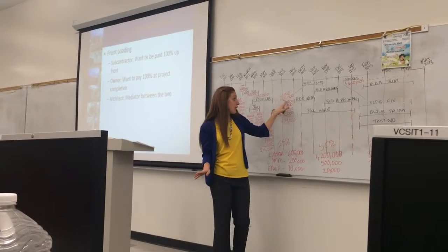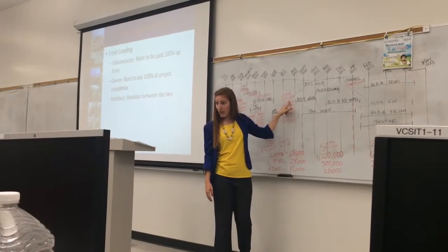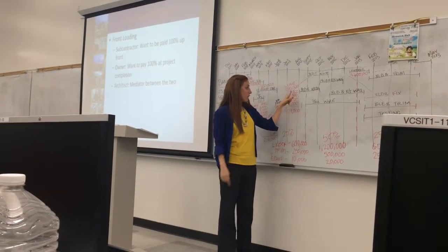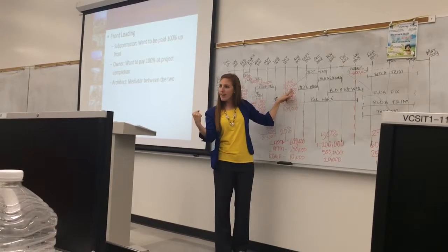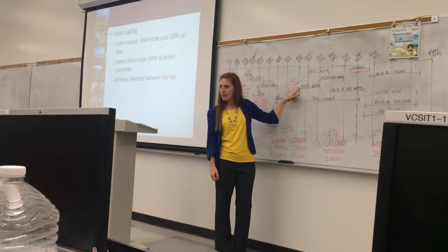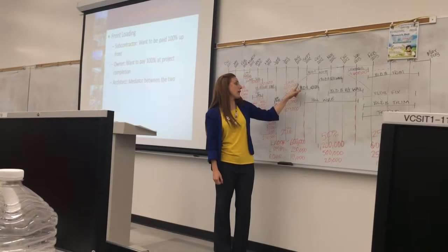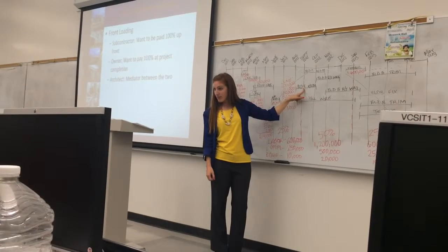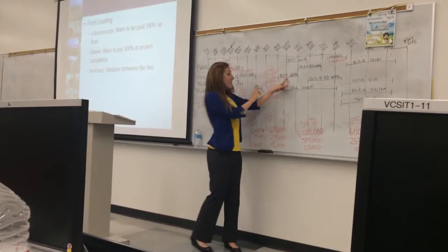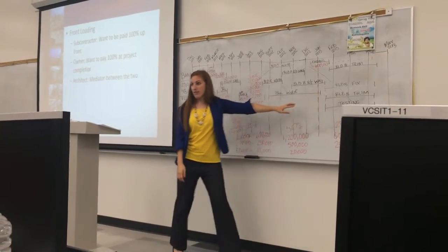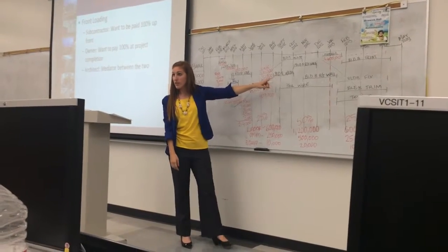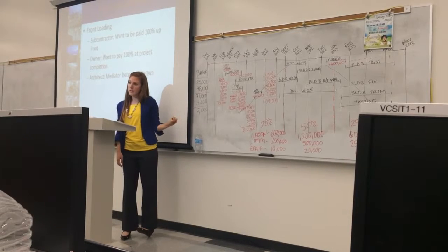So then they negotiate it, we're about 15 days later, and I'm still expending all this cost. We get it negotiated, great, it's the middle of the month. It's set. Now I gotta wait another 15 days before I can bill it. Now I'm done working, and now I gotta wait another 30 days till I can collect it. So I've expended all this cost that I haven't accounted for anywhere else, and I'm not getting paid for 30 days, so I'm taking out a loan to cover that, or I'm lucky enough that I have enough built up in the bank.